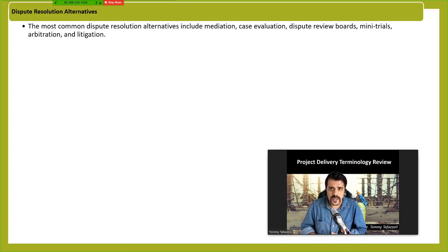It's just a suggestion. And if it didn't work, you could go with arbitration, in which an expert is invited who studies all the project documents and then decides who is at fault, or how the fault should be distributed between the parties involved in this dispute.